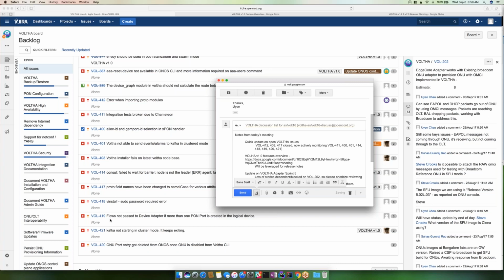Right. Okay, so I think what I'm hearing is 9/11 is going to happen anyways. So let's go ahead and by end of the week, 9/8, get an RC build that will be used for the first cycle of testing. Is that the plan? Yeah, and I know it's not ideal, but we need.